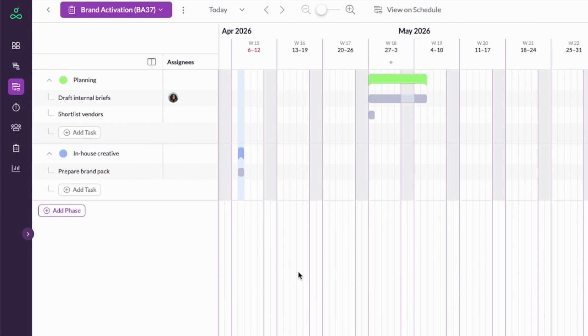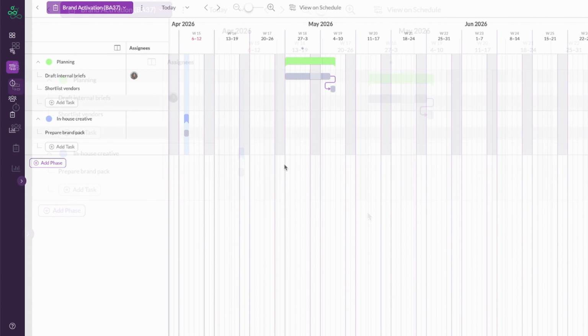So, we've got someone assigned to the task, but there's another aspect of project scope to think about here: how to get around blockers. More often than not, getting one task over the line is dependent on getting another one finished beforehand. Hence, dependencies. By clicking here and dragging, you can associate two distinct tasks. Then, you'll be able to see any tasks that need to get done before another can begin.